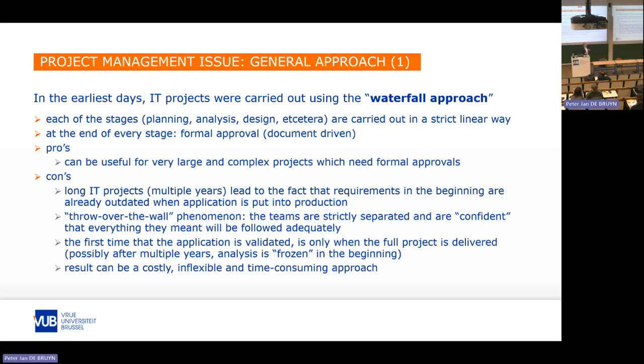What equally happens in this setup of a project is that the first time that an application is validated is only after the project has been delivered. So there might be a big time gap. It might really deviate from what you want, from what you imagined. And also from a management point of view, it's quite tricky. You're investing millions and years and a lot of resources into something, and you only see the very first usable result after years.